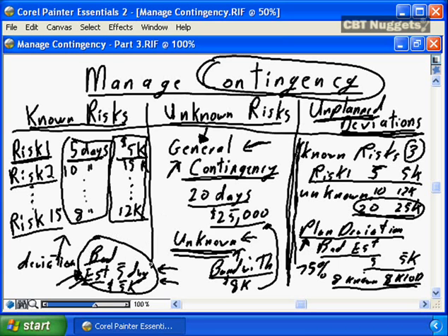The big thing you have to watch is that you're not consuming contingency early in the project to hide schedule deviations, that you are reserving the risk contingency for later in the project at the 75% complete level, when it is truly known that the project is likely to succeed and that it is acceptable to begin to consume contingency for simple planned deviations, as opposed to reserving the contingency for the actual risk events.